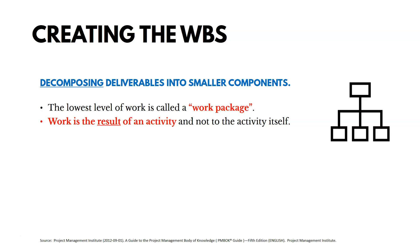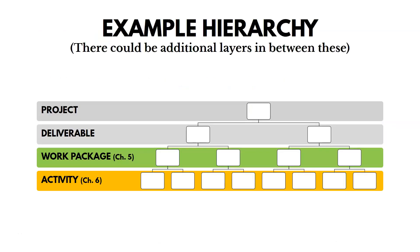Here's an example. On a house, work packages might be the roof, the flooring, the foundation, the walls, the plumbing, the electrical, and so on — they're packages of work, results of an activity. In the WBS hierarchy, you have the project at the top, then different deliverables, and then work packages at the lowest level.